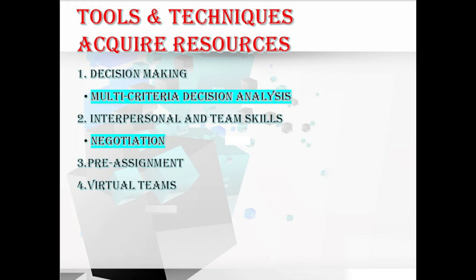The next technique is pre-assignment. When physical or team resources for a project are determined in advance, they are considered to be pre-assigned. Pre-assignment might also include team members who have already been assigned in the project charter or other processes before the initial resource management plan has been completed.